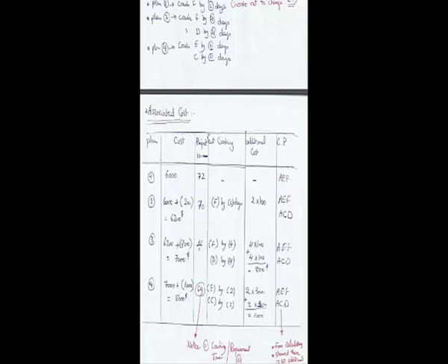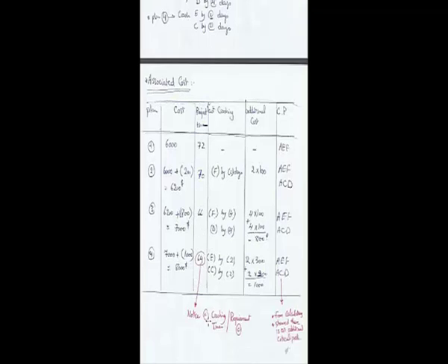And the 66 days for both critical paths AEF and ACD were decreased by 2 days, so the new crashing time is 64. You notice that the 64 days were equal to the crashing time that we have calculated in requirement number C or requirement number 3, okay?